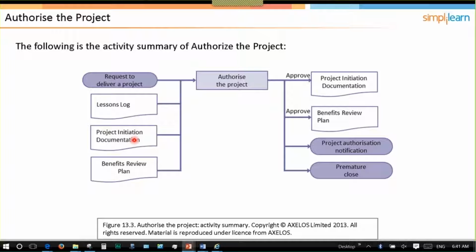It basically forms a contract between the project board and the project manager. They're both agreeing that the way we're going to manage the project is described in the project initiation documentation, and we all believe that we can achieve the results that we intended to with it, and we will be successful. So there's three primary uses. We use it to ensure there's a sound basis before we go to the board for a commitment to the project. It acts as the base document against which we can assess our project and viability of the project.